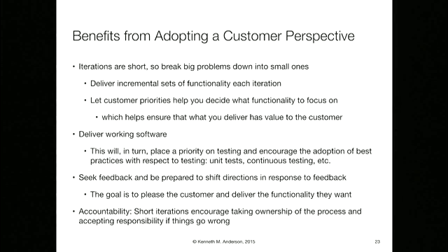All right, so benefits from adopting a customer perspective, why it's beneficial to you as a developer to be thinking in terms of the customer. One is that a customer wants to see progress. So, to show progress and keep them happy, your development life cycles and iterations should be short. Deliver incremental sets of functionality every iteration. That helps let the customers prioritize what you do. You have all these requirements that you could be focusing on. Let them tell you what you're going to try to achieve first. And then you know that if you achieve this high priority item and give it to them, it should deliver some value. It should make them happy.